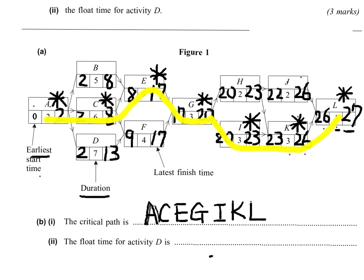Now we're going to look at the float time. So I'm going to use example F here. Now F starts on day 9 and takes 4 days. So 9 plus 4, actually it finishes by the 13th day, but F got till day 17 to complete this task. So actually 17 take away 13 is 4, 4 days float time.